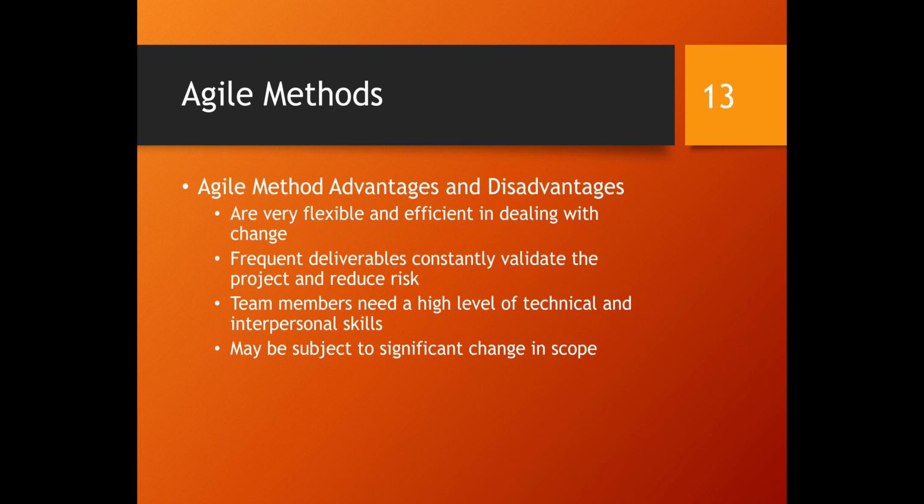But anyway, it may be subject to significant change in scope, because if you change every day, scope might be changed as well. So you have to be careful. That means you need to have someone who can control the scope, like the project manager, who can help control the scope of the project, not to be too big or change too much, for that kind of Scrum in the agile method that we have.